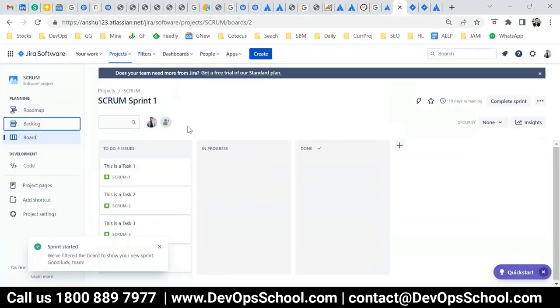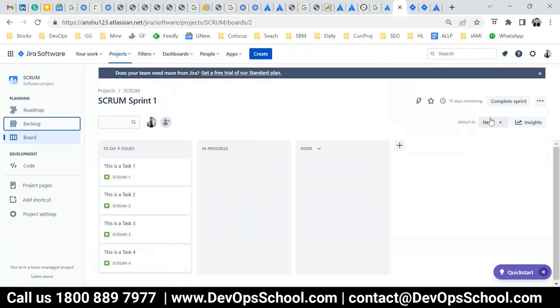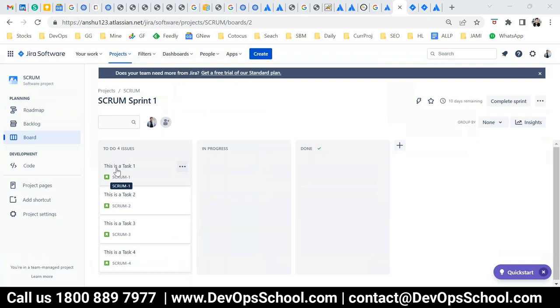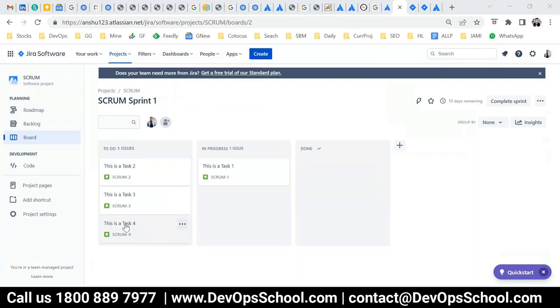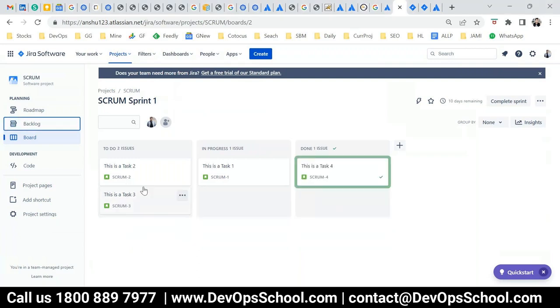You might be hearing this keyword sprint one, two, three, four, something like that. So every day we'll have a meeting. I'll, because I'm a scrum master, I'm going to ask you Dhanush, what is the update on task number one? You say okay, in progress. Then I'll ask Ritesh, hey Ritesh, what is the update on this one? You'll say you're on hold, you have not started it. I'll ask Sunil every day, hey Sunil, what is the task straight, status for this one? You say it's done. So end of this way, every ticket has to be done. But unfortunately one ticket is not done, in progress still. And we will complete the sprint.